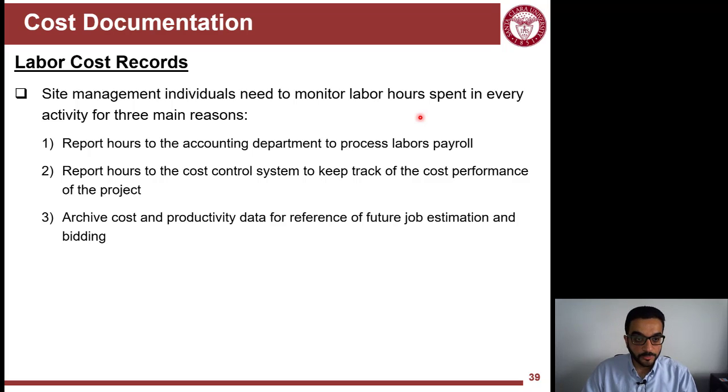You need to pay people, and you need to know if they're doing their job and following the productivity rates that we expected. And if they're not, then we need to update our records to show that workers maybe became more productive, or there are issues with their productivity. For example, I'm recording this video in the time of COVID-19. COVID studies show that it hammers productivity by 15-20%. It lowers productivity. So now, with documentation, I can track the impact of COVID. I can reflect that in future projects if the COVID reality stays for a longer time.